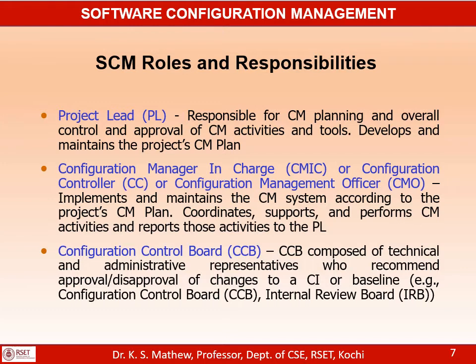So the configuration manager in charge implements and maintains the configuration management system according to the project CM plan. He coordinates, supports and performs CM activities and reports those activities to the PL. And in some projects, a small project for example, the project manager himself or herself can take the role of CMIC. So the CMIC role will be taken up by the project leader himself. It's possible if it is a small project. If it is a big project, the CM role can be assigned to a separate individual, and the project leader will be involved only in planning the CM activities, and implementing the plan will be taken care of by the CMIC.